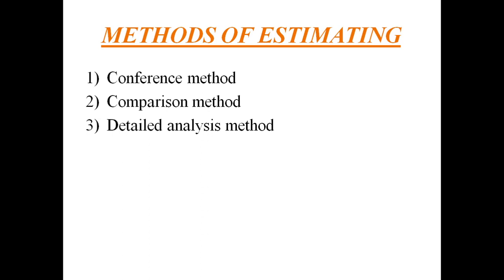A coordinator from either accounting or estimating then collects these costs and applies overhead factors to develop a total manufacturing cost for the product.